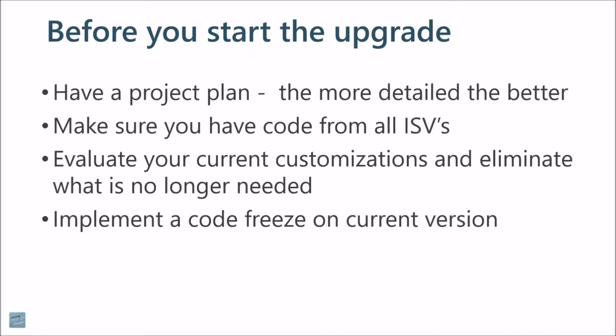The other thing that I will tell you is that you should plan to have buffer in that project plan. How much buffer you have really depends on the size of your project. I would say any project should have at least 1 week of buffer for something to go wrong.